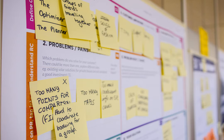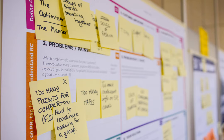Identify your iteration goals. In scrum, you must always have a central coherency to provide focus to the sprint. You can then use the sprint goal to focus the team's energy and capacity on the right things. If you're following some other agile methodology, then you still need to find a way to help the team focus on rapid mini iterations towards the definition of done, rather than on just completing lots of things. The lack of an overarching goal often drives incomplete iterations, because team members are focused on getting their individual tasks done rather than on completing the gestalt plan for the iteration.